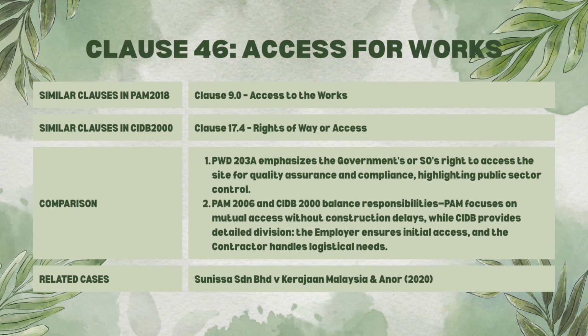However, the High Court dismissed the claim, emphasizing that Sanisa had not submitted the written notice within the stipulated 30 days period following the delay event. This decision underscored the critical importance of adhering to contractual notice requirements when seeking remedies for access-related delays.